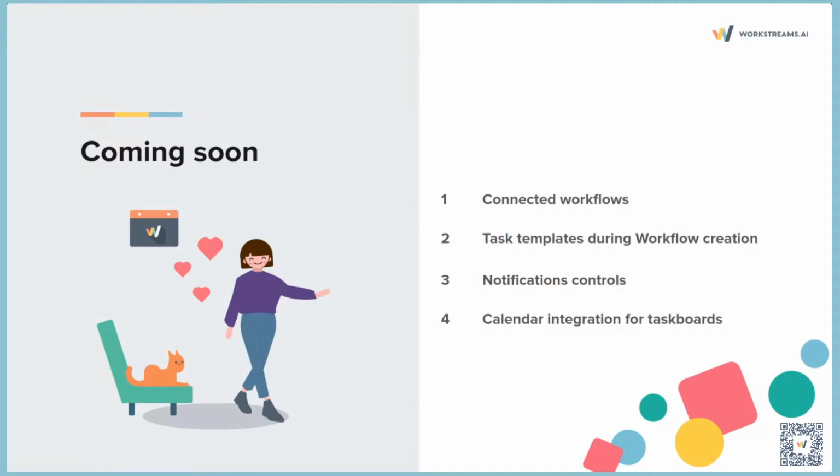So basically, you have a calendar which is connected to someone in your team, or you can freely choose, and you can set this up on every task board separately. What this means is, as soon as you connect the Google Calendar or Outlook Calendar to one task board, everything which has a due date on this task board will end up in your calendar. Then you can use the features in your calendar itself to display it accordingly, be it as an event or something else.